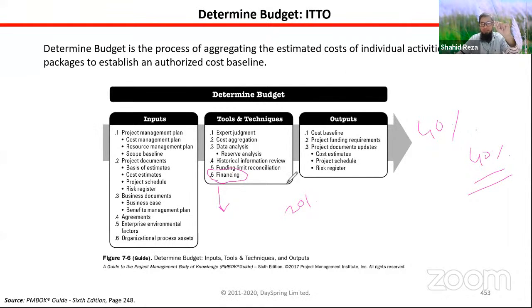For government projects, this is very important. For government projects, you'll always see this. For example, this is a World Bank financed project. Or this is, say, a Netherlands government funded project. And also the government of Bangladesh fund will be used. So you will always see how much money the World Bank is giving. Say 60% is given by the World Bank, the government of Bangladesh gives 20% of the project budget, and the rest is given by the Netherlands government. So that is the financing information for government projects.